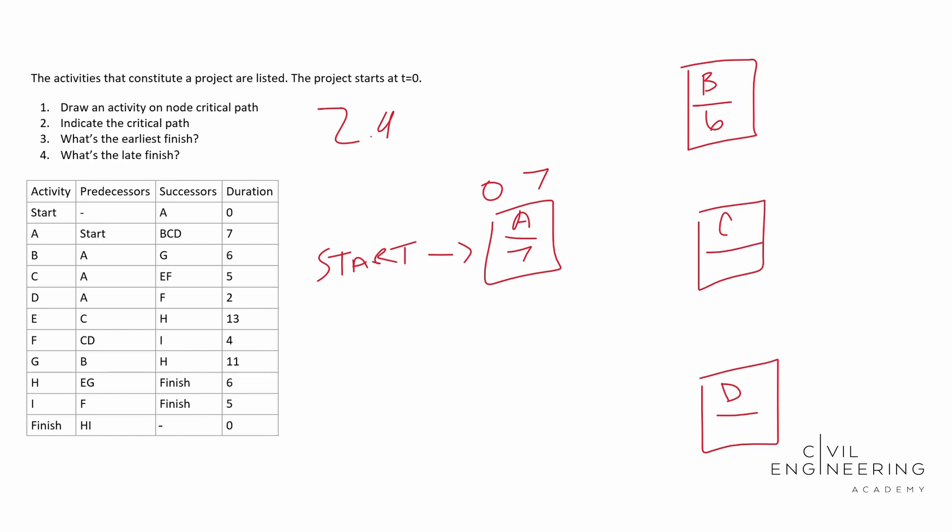So B lasts for six days. C lasts for five days. D lasts for two days. And A goes to D, A goes to C and A goes to B. All right. Awful arrows there, but we'll get the point. So now we have to find our earliest start for BC and D. And it's exactly what you think it is. It's going to be seven because B can't start until A is finished. The soonest A can get finished is on day seven. The soonest that B can get started is on day seven. Same thing for C, same thing for D. Since B is six days long, it's going to have 13 be its early finish. And then for C it's five days long. So its early finish is going to be 12. For D it's going to last two days. Its early finish is going to be nine.